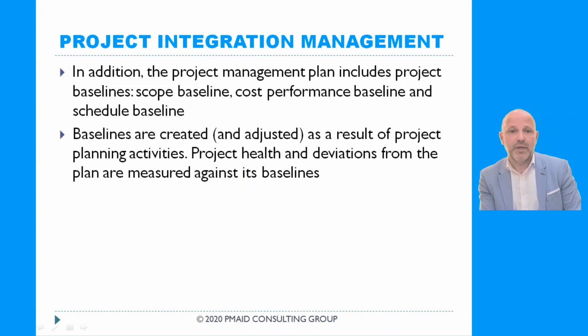In addition, the project management plans include project baselines, for example, scope baseline, cost performance baseline, and schedule baseline. Remember, triple constraints: schedule, budget, and scope. Baselines are created and adjusted as a result of project planning activities. Project health and deviations from the plans are measured against its baselines.